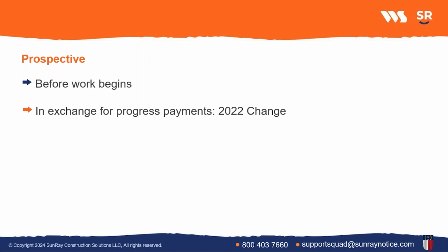And even if you did sign something that claimed that you waived any claims to payment for future work, it would be invalid and unenforceable. So the only things that lien waivers can permissibly waive under North Carolina law is claims to work that has already occurred and for which payment has or is being received. That is the extent of progress lien waivers.